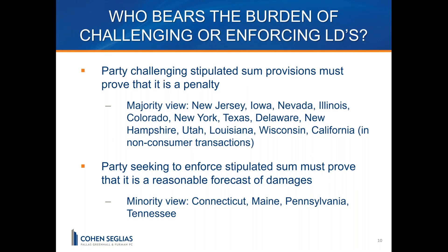One important thing to address is the burden of proof, which matters a lot in litigation or arbitration. In the majority view — the majority of states — the party challenging a liquidated damage provision has the burden. Those states, including New Jersey, Delaware, New Hampshire, Wisconsin, and California in non-consumer transactions, will enforce the LD unless there is an appropriate challenge. In the minority view, which includes Pennsylvania where I'm based, the party seeking to enforce the stipulated damage has the burden to prove they reasonably forecasted their damages when setting the liquidated damage amount.